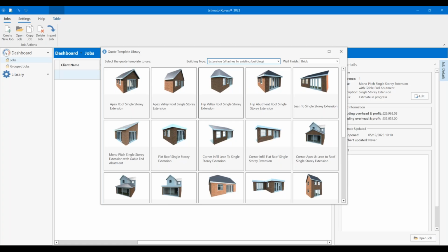These templates are pre-configured shapes and calculators so that you can quickly get estimating a simple type of build. So with the input of the length of the walls, height of the walls, and pitch of the roof, it will give you the basic shell of the construction: foundations, footings, walls, plastering, decoration, connecting walls in the case of extensions, roof, and so forth.